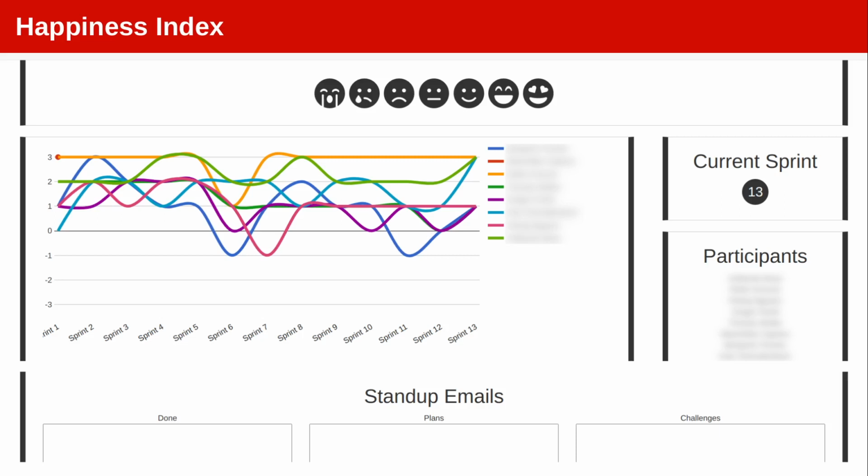And you do this anonymously, but everyone can see the overall team's happiness by individual items. You kind of average it out perhaps over the course of the project. You see the x-axis is the timeline by sprint. So you answer the happiness index once at the end of a sprint, and you can see how things are changing with respect to happiness.